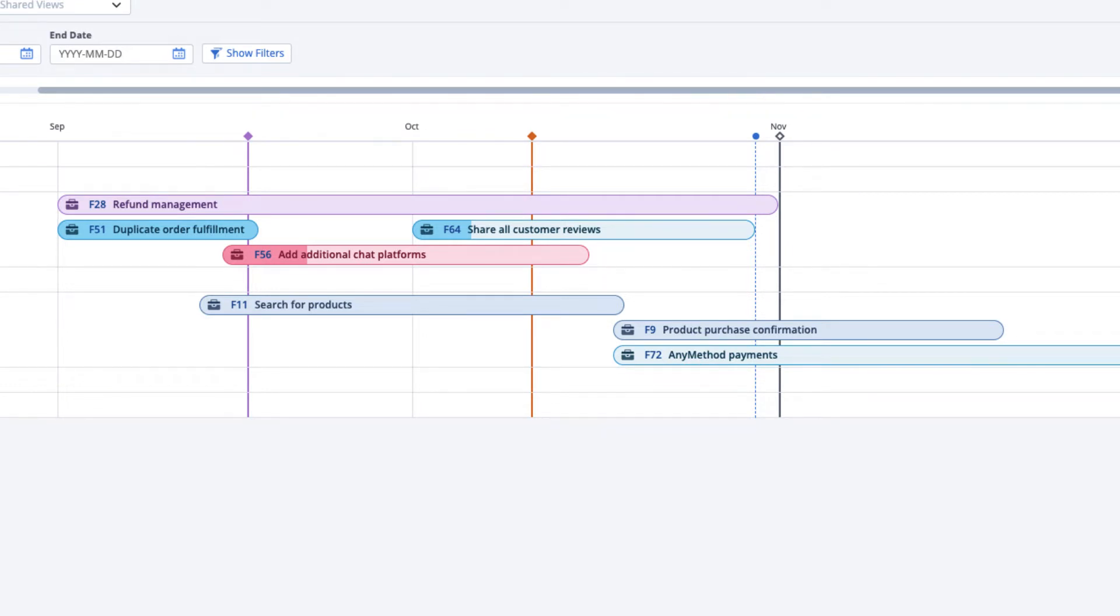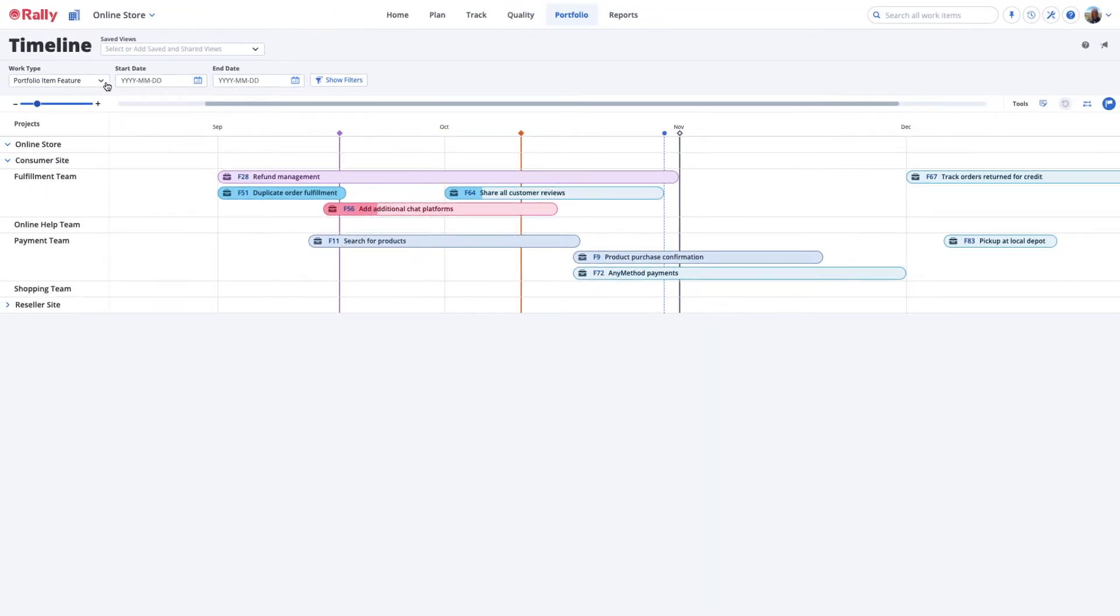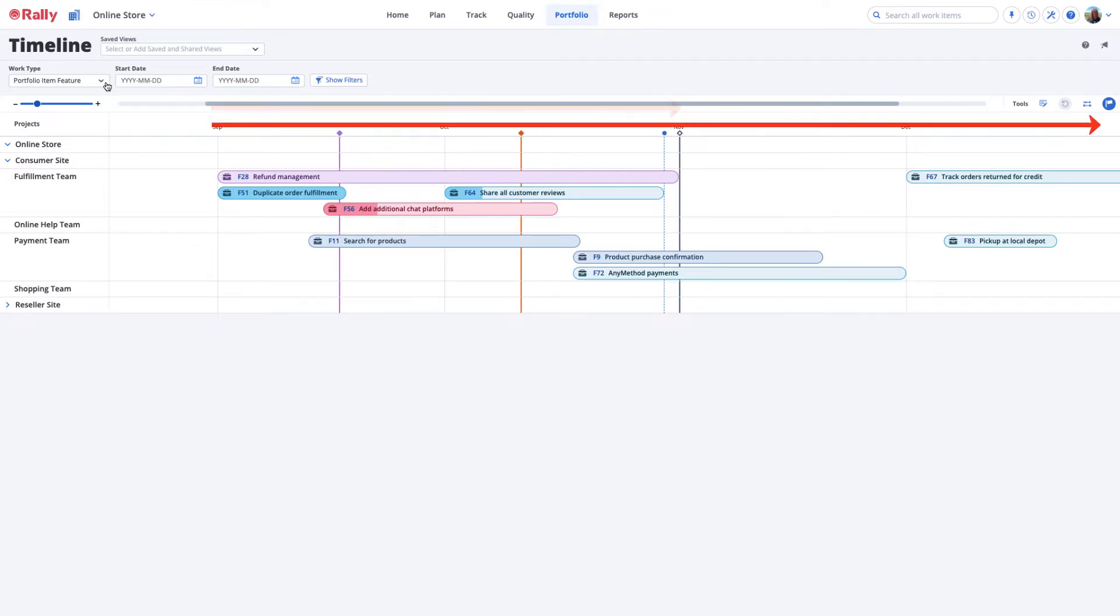You can use the Timeline page to show committed plans, intended plans, or both, with committed plans showing closer to the present time and intended plans laid out on the timeline into the future.